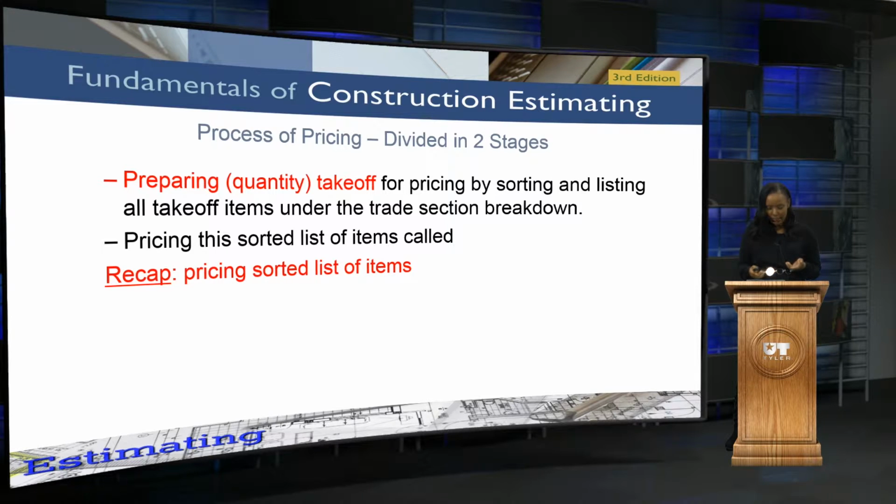Doing a recap also helps to break down areas of the estimate, so that if you have a specific question, it's helpful as well. So for instance, you would say, what is the total amount in the estimate for excavation equipment? Or what about the labor? What about the material? So you can really break this down as much as possible to help you out.